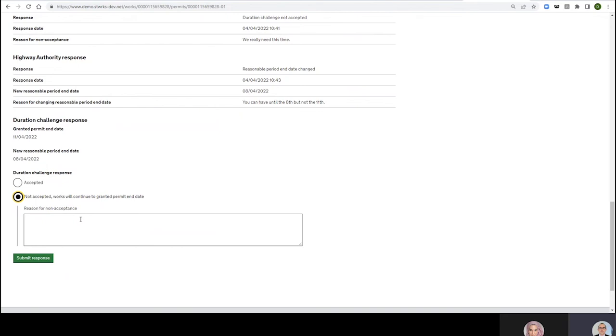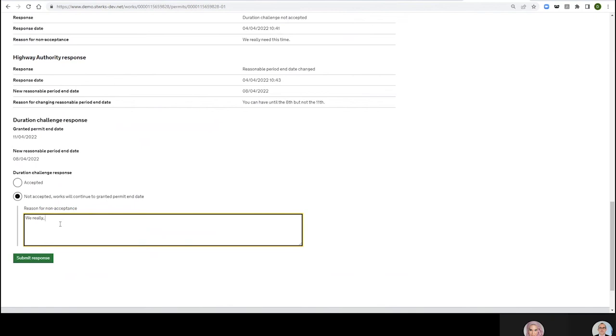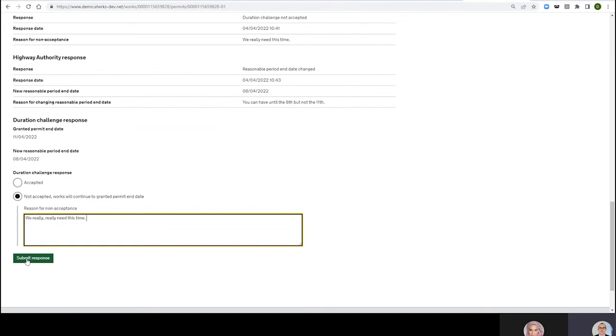Works will continue to Granted Permit End Date. We chose those words quite carefully. We've got a granted permit until the 11th, don't forget that's our permit end date. Reason for Non-Acceptance: We really, really need this time. Forgive me Charlotte for these slightly flippant reasons, I can't come up under pressure with realistic examples. Submit Response.